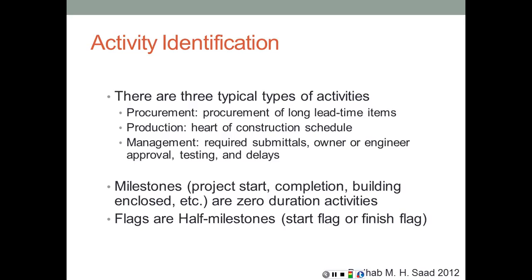We also have something called milestones, which we mentioned initially. The project start is a major milestone. The project completion is a major milestone. The building enclosed is a milestone. Substantial completion is a milestone, and so on. These are zero duration activities. It just shows that this is the separation between the previous phase and the following phase.